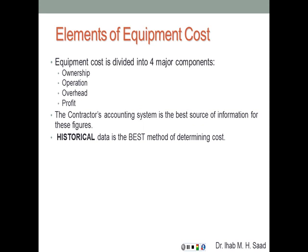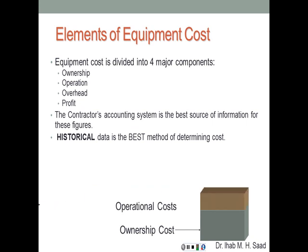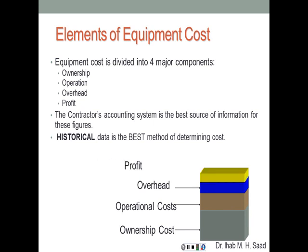Equipment costs can be divided into four major components: ownership, operation including maintenance and repair, overheads, and profit. The contractor's accounting system is the best source of information for these figures, and historical data is the best method for determining cost. The ownership cost is the predominant part because purchasing that large asset is the biggest bulk. Then there's the operational cost of running, maintaining, and repairing the equipment from time to time.